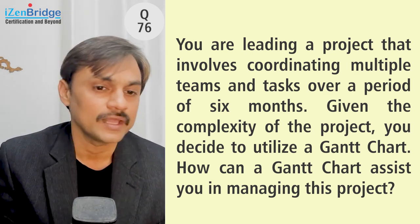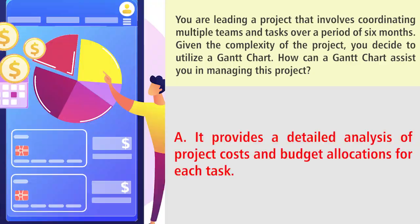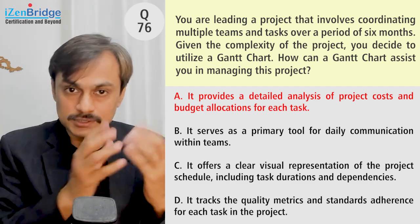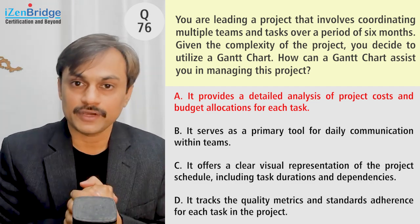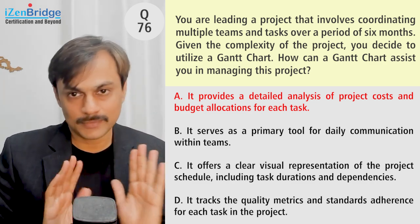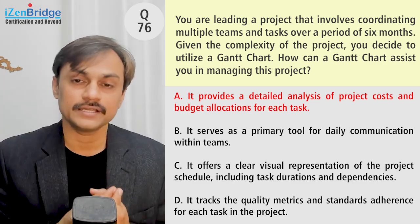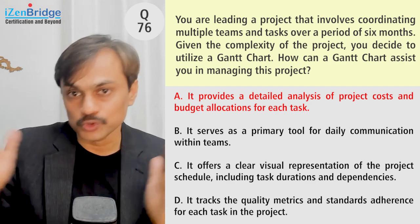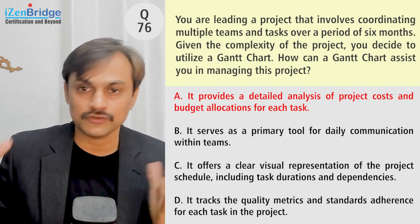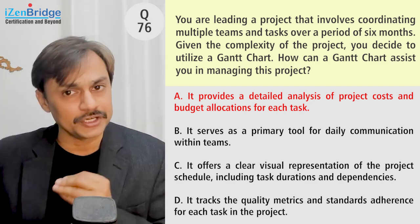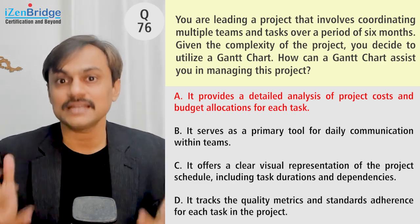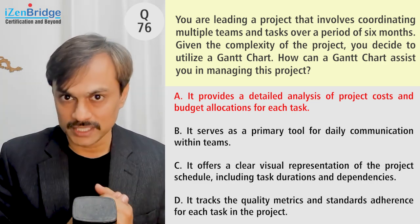Option A states it provides a detailed analysis of project cost and budget allocation for each task. The tool used for Gantt charts, for example MS Project or Primavera, may include costing information because it is integrated there. But the Gantt chart as a representation has less to do with costing — it has more to do with showing the timeline and critical path. So selecting a cost option is a little risky here because that is not the primary purpose of the chart.